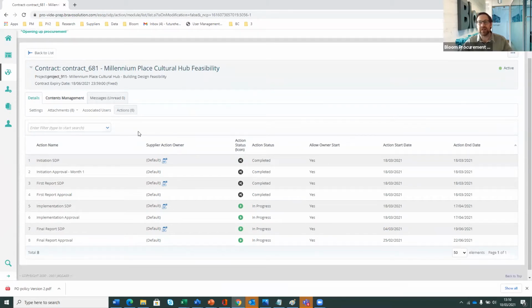So at this point, we may have various types of project here. If it's an outcomes or deliverables based project, we're going to have specific milestones. It may be that you are billing on a monthly cycle. So we have monthly milestones against which you will bill for work delivered. Or it may be more of a call-off type arrangement where you have one milestone against which you will submit your billing information incrementally as you've delivered elements of the work.